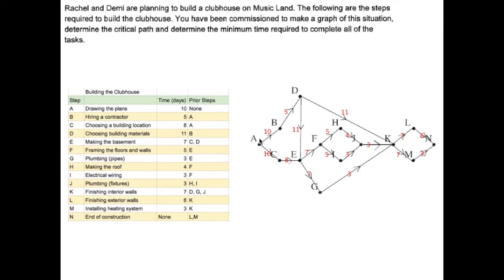Now let's think about our critical paths. The first nexus point is E. I can take A to B to D to E or A to C to E. A to C to E is only 18. A to B to D to E is 10+5+11=26. I'm definitely going to go this way. To get to K, I could come via E to G — that's 7+3=10 — or via E to F to H to J, which is 7+5+4+3=19. So I'm going to go via E to F to H to J. And then for J to K versus the G to K branch: 7+5=12 is longer than 7+3=10, so I take the 12 route.